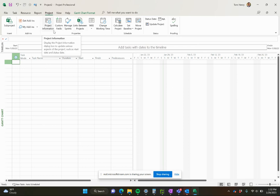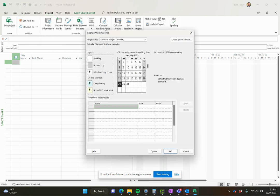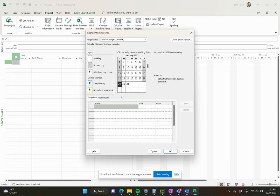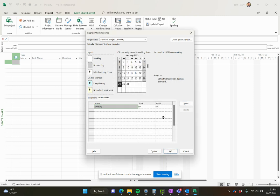Second thing we need to do is come to change working time. In here, this is where you set up the calendar. So if you're in America, it's going to be 8 to 5 Monday through Friday for the most part. You can actually come in here and edit the work weeks by clicking on work weeks and then details and you can say, well, actually we work a 10 hour day, or if you're in the Middle East, maybe your Sunday is actually a working day, things like that. So you can set these up. You can say that we no longer work Fridays or we do work Fridays or the 8 to 5 Monday through Friday.